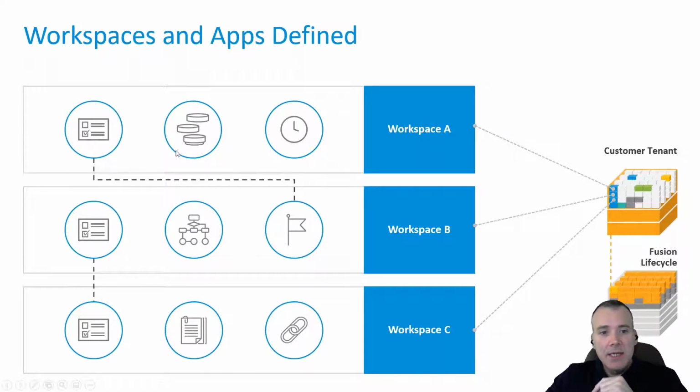These things can be linked together so that a problem report, as it goes through its workflow, triggers a change order, which might even include a series of tasks that then eventually populates and pushes information or manipulates information on the actual part number record.